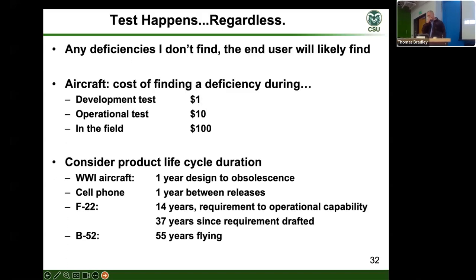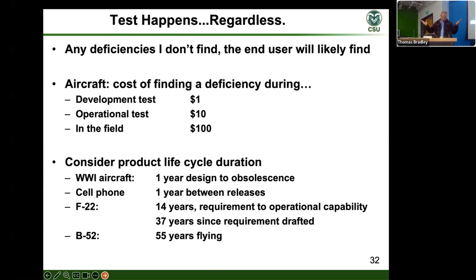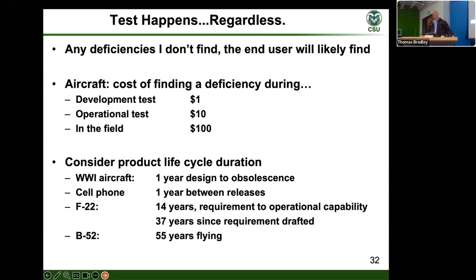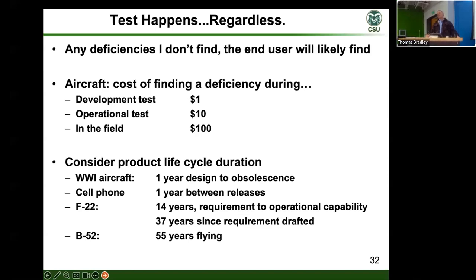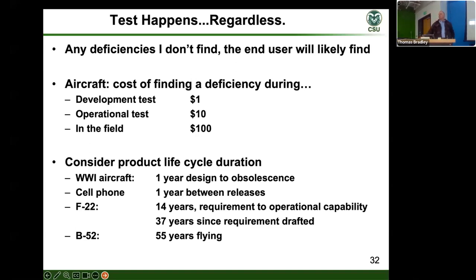A couple of obvious but not-so-obvious basics. First: testing is going to happen whether we test it or not, because at some point the end user is going to get the system and test it. So when a project manager says 'let's cut some of our testing out,' the question becomes: where does the risk fall? Do we assume the risk in development, or do we let it fall to the end user, where it may cost a couple orders of magnitude more to fix in the field?